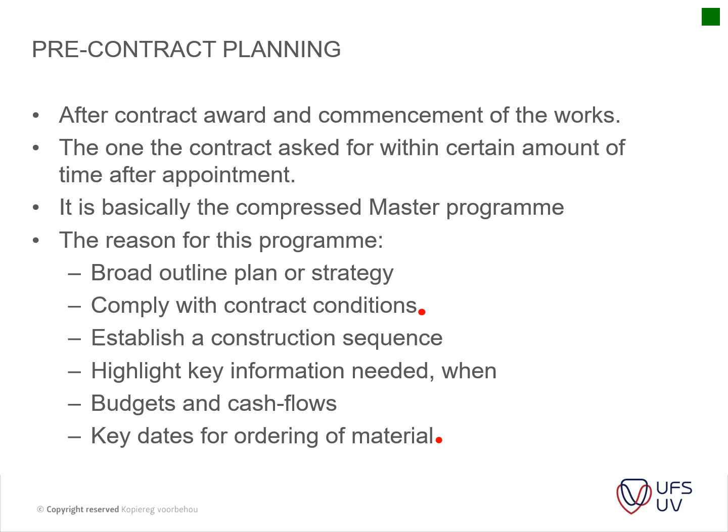So that's the difference; some contracts may ask for more detail than others, so please take note of that. Although, for instance, with JBCC contracts, we usually amend it to look the same as the GCC with your program. So whenever you do a tender, have a look at or ask what they're actually requiring.